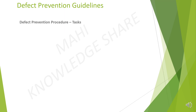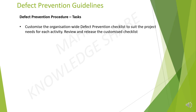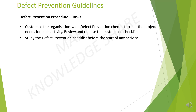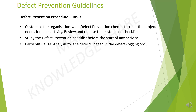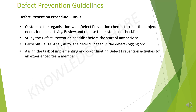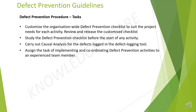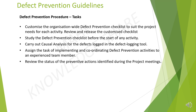Step 2: Task. We need to customize the organization-wide defect prevention checklist to suit the project needs for each activity. Review and release the customized checklist to all the stakeholders. Then, all the team members should study the defect prevention checklist before the start of any activity. Then, carry out causal analysis for the defects logged in the defect logging tool. Then, assign the task of implementing and coordinating defect prevention activities to an experienced team member. Then, review the status of the preventive actions identified during the project maintenance.